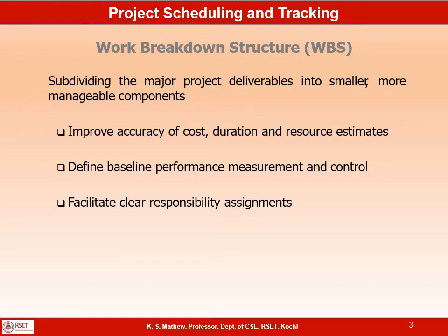Once you set a duration for completing a sub-deliverable, when you actually do the activities for producing it, we can compare the estimated duration with the actual duration and see whether it is going as per the schedule or there is a slippage in that activity. So it becomes a baseline for measuring your performance.